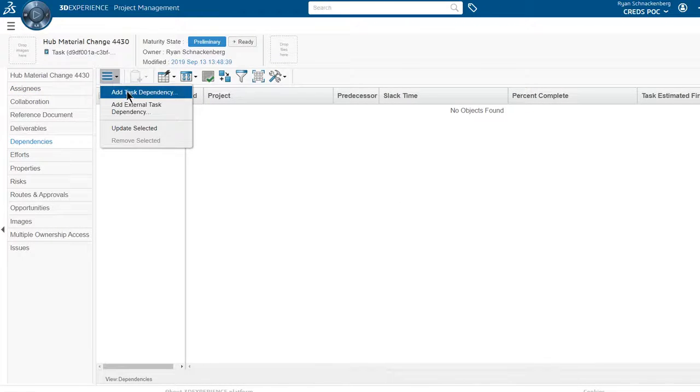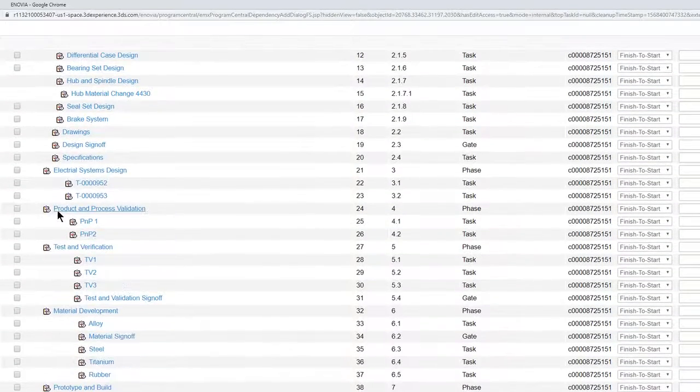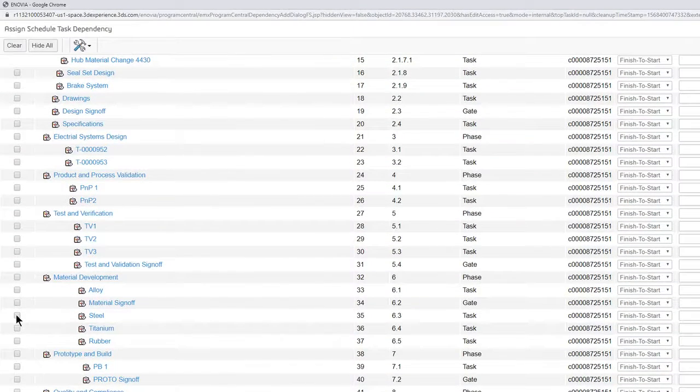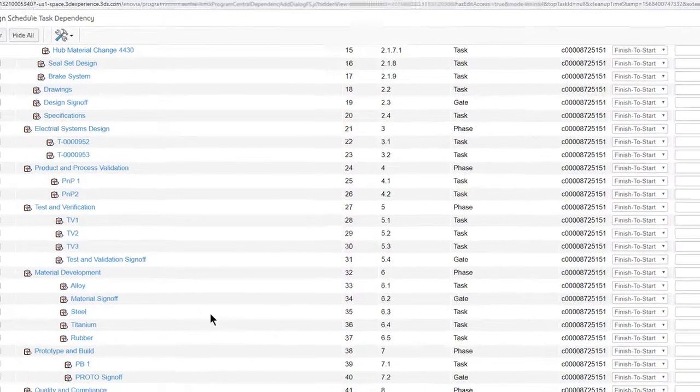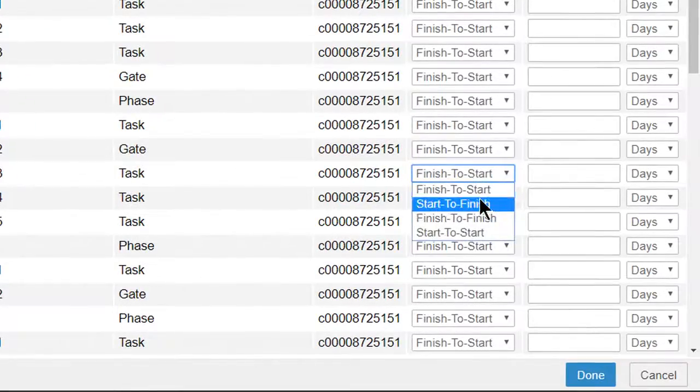The new subtask must be finished before the steel task is promoted to the complete state. Ryan creates a dependency.